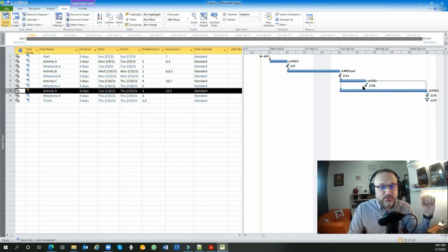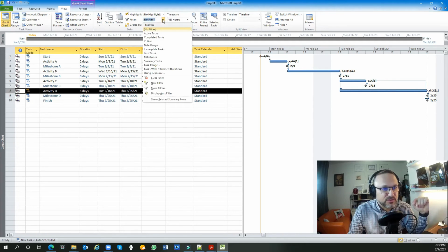Okay, now you can see from this that these activities are finished to start up to the end, but this activity is finishing and waits until activity D is finished. That means this activity is floating. This activity is floating and could be delayed for some reason until here. Okay, so once you are reaching this point, you give the priority to the activity D, where you have the critical path. So let's just